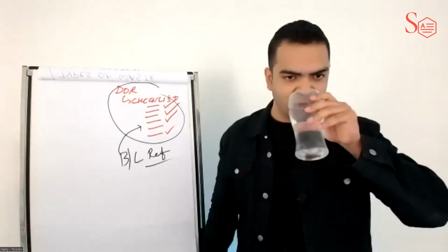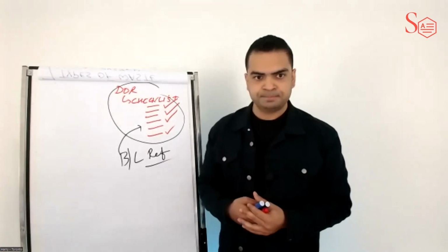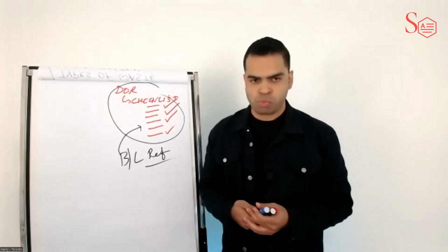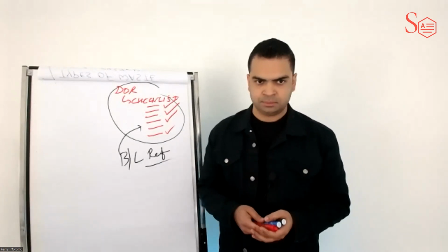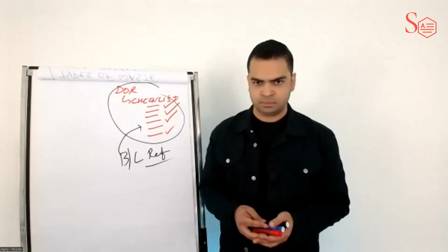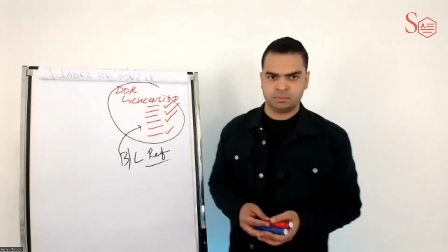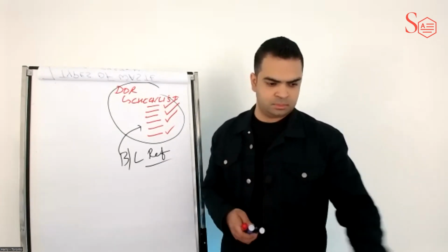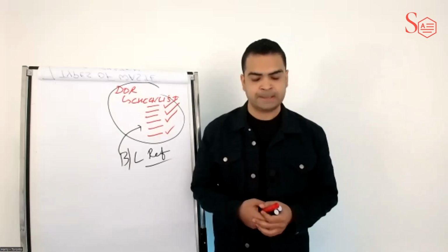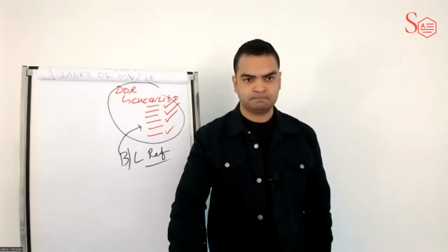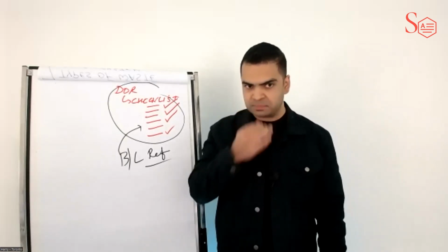So refinement is a review of stories. Sometimes those stories have already been created by others. Sometimes you create stories collaboratively with the team, and you come up with the description of the user story as far as what you need, any details you might need, and then the acceptance criteria. And a question I like to ask in refinement at the end of the story to help avoid transport waste is to just ask the team members, if you were committing to this story, is it ready for you to develop? And if the answer is no, then we've got some more work to do.